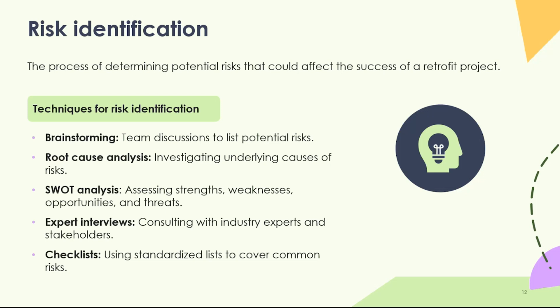Doing a SWOT analysis: your strengths, weaknesses, opportunities, threats within your internal organization, and factors that could impact things externally as well. Expert interviews, so simply talking to people who know a lot about these particular issues, and there's a variety of places you can get that kind of insight.